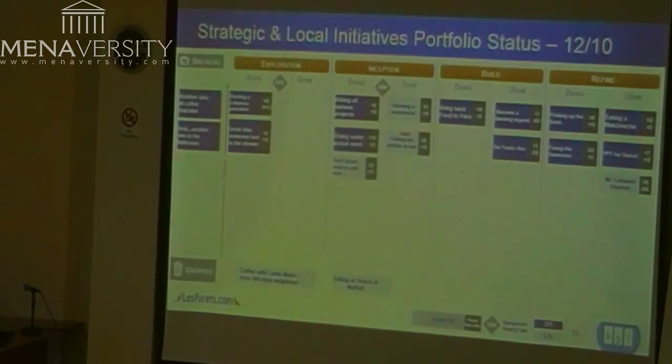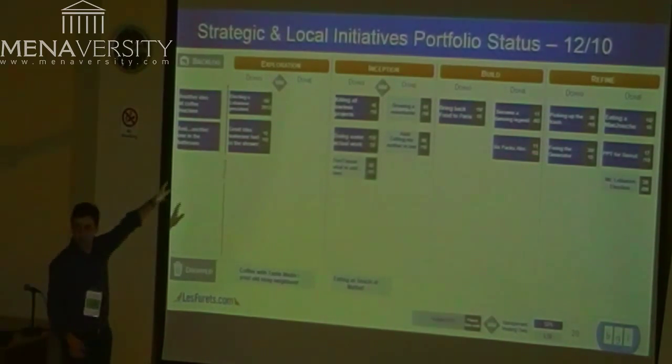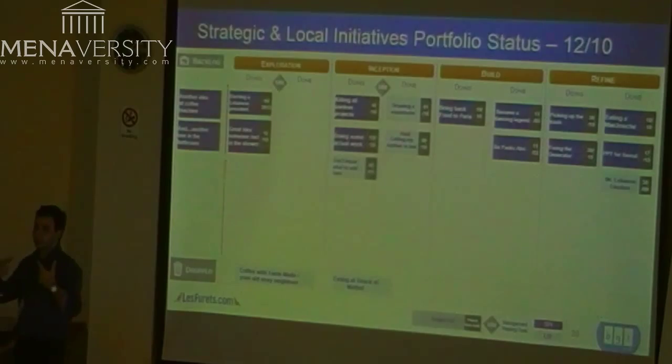What happens usually when there's a new idea is that customers are very tempted and start to talk about it from the start. They would forget everything you are working on right now. It's very tempting, it's very human. This is why I really advise to start by explaining what is dropped, and this is already agreed before. This way you won't have a debate on it.